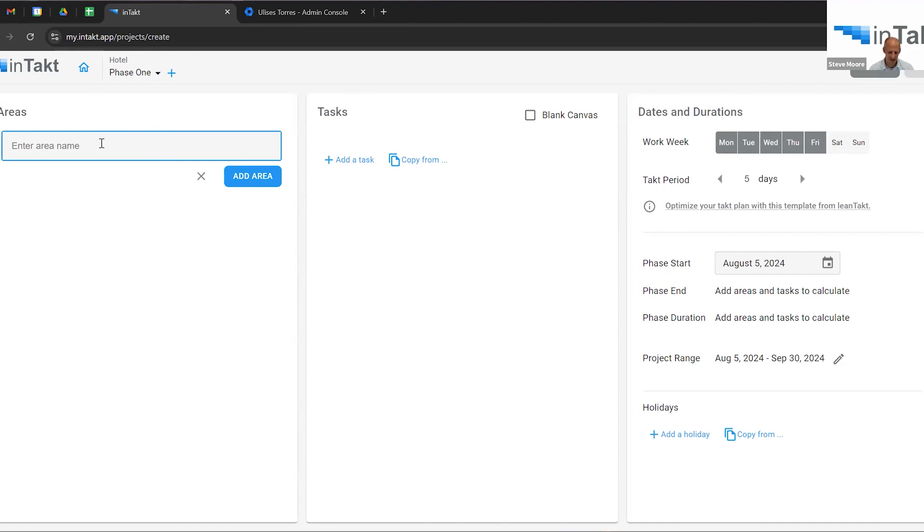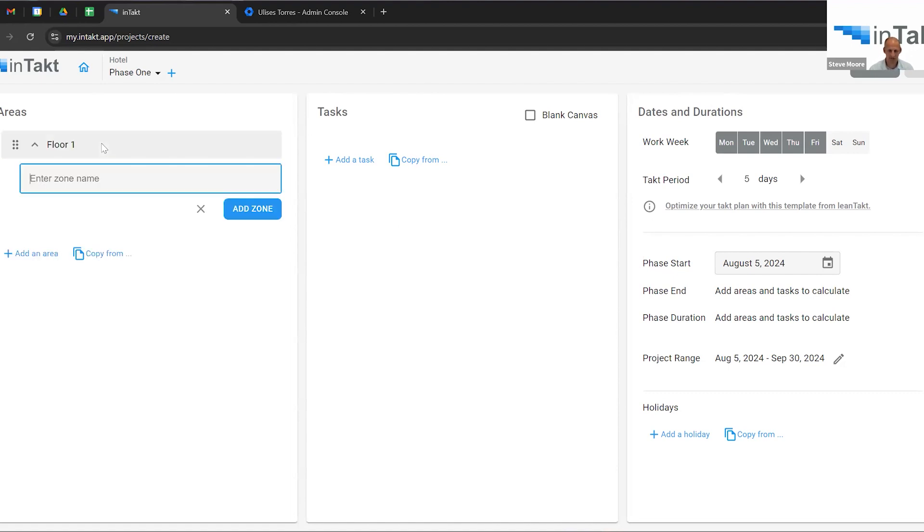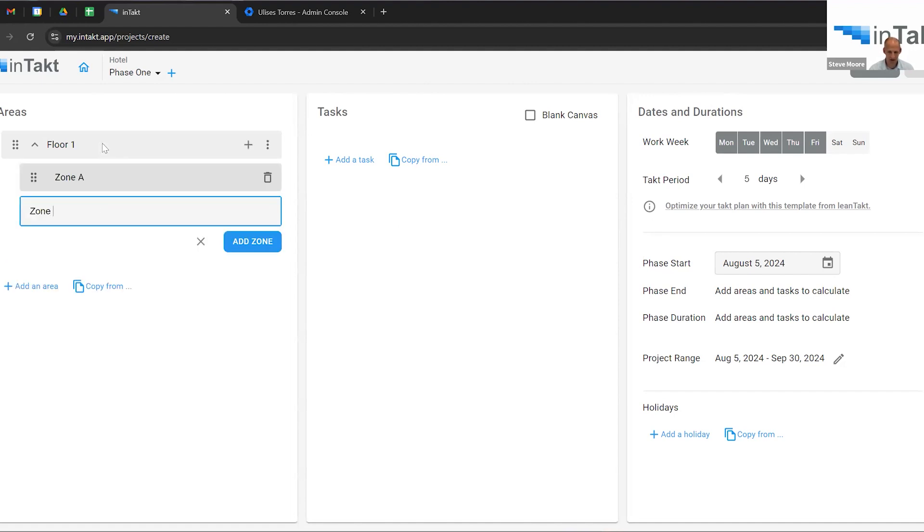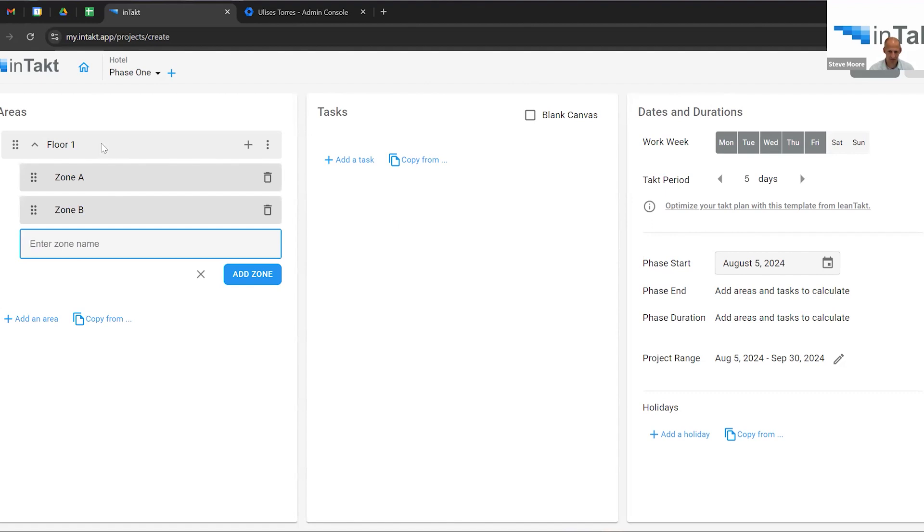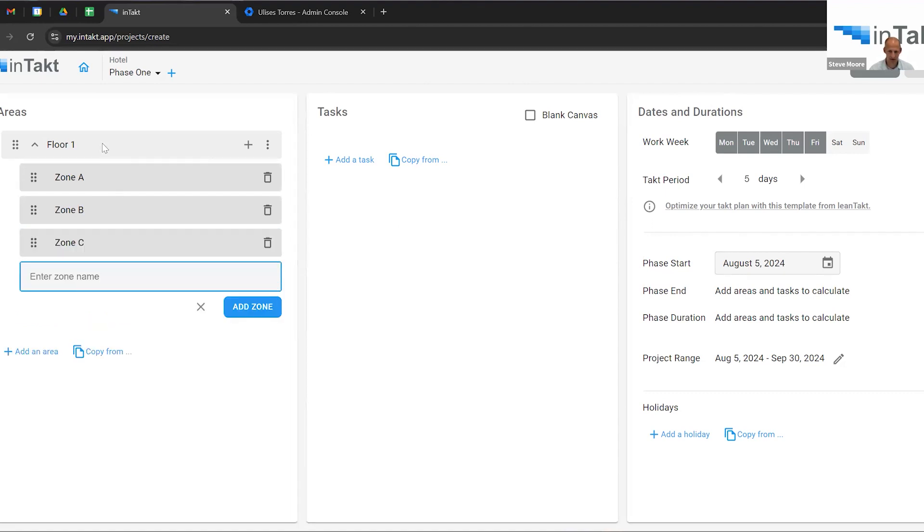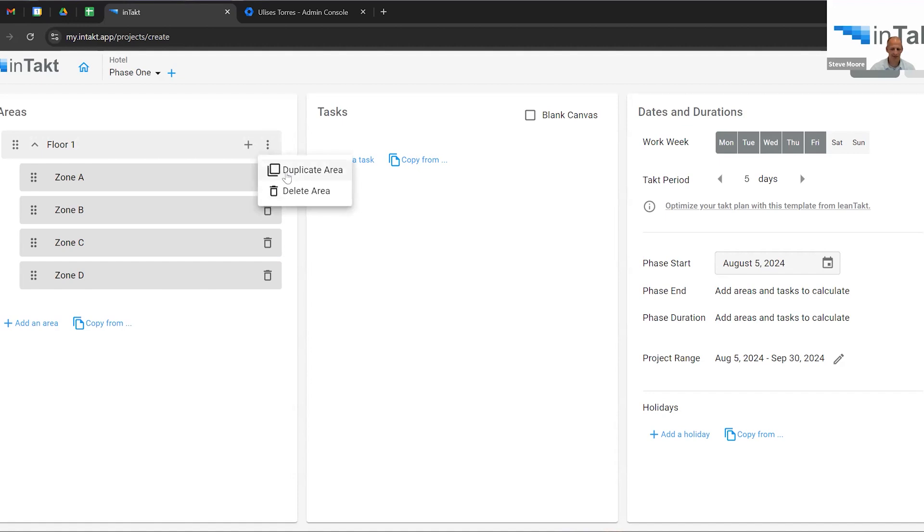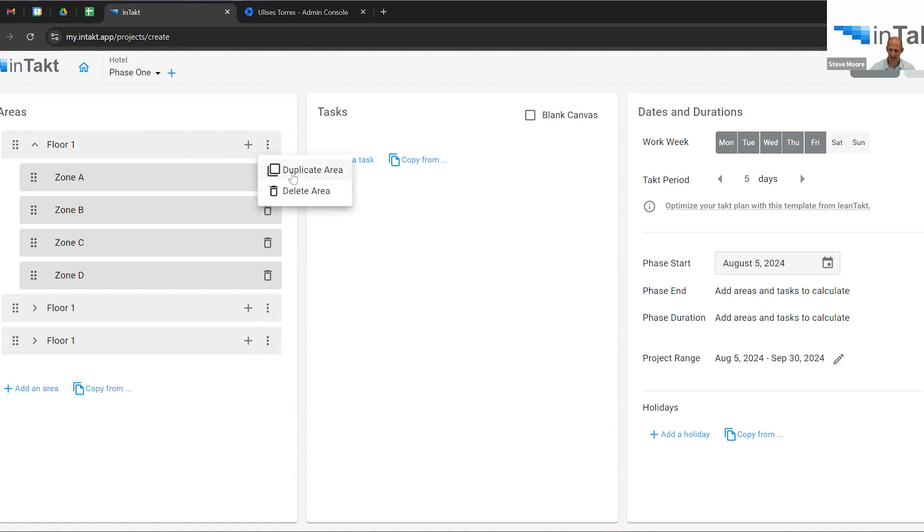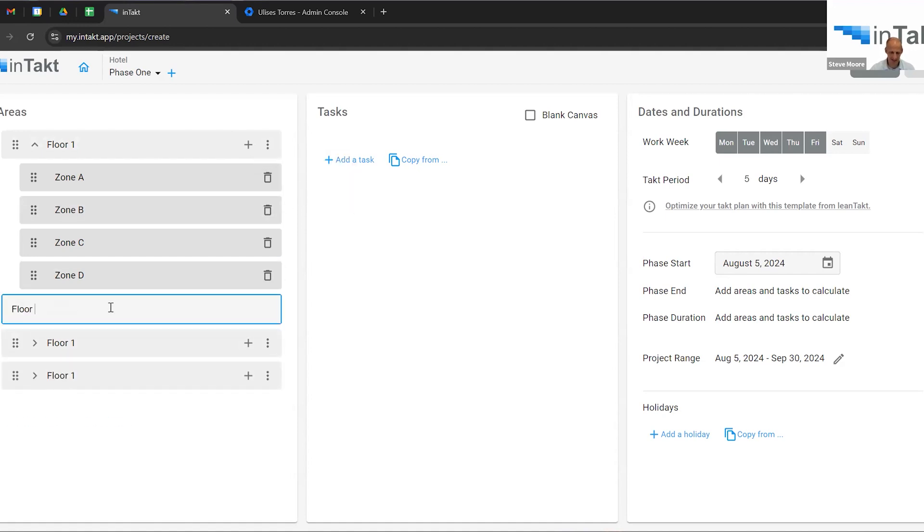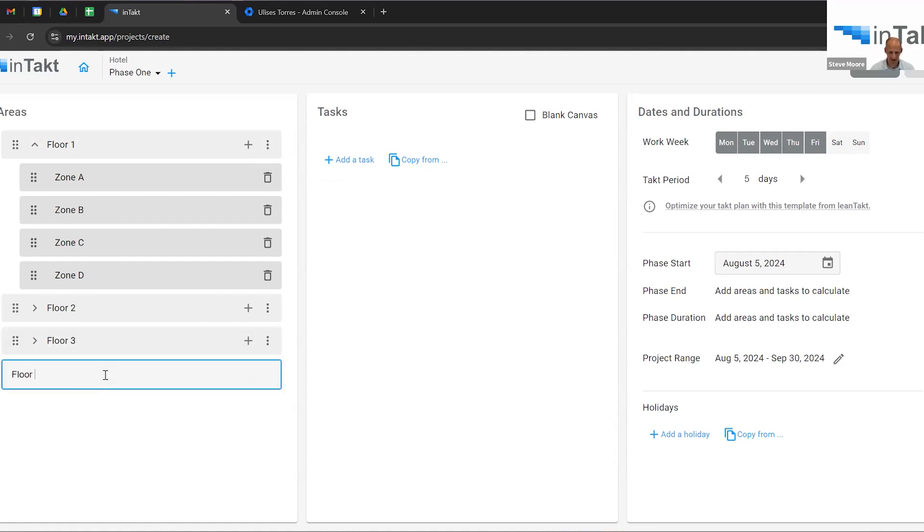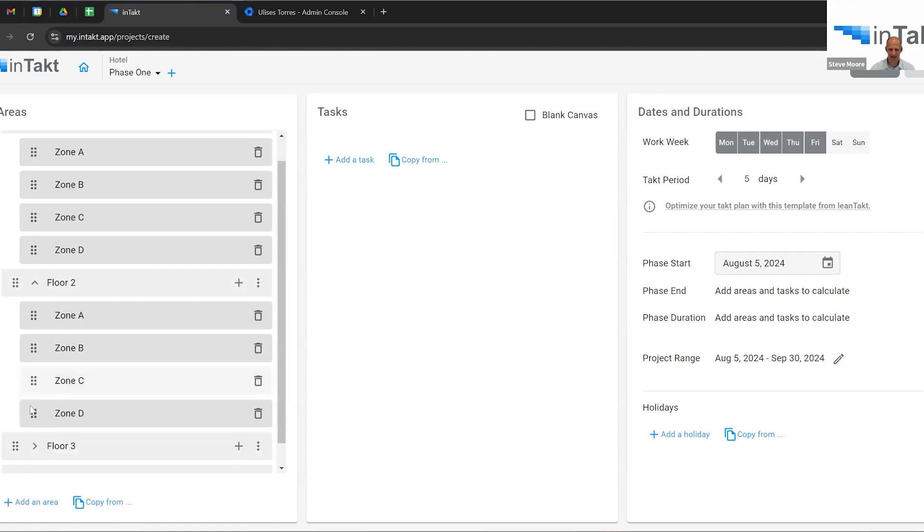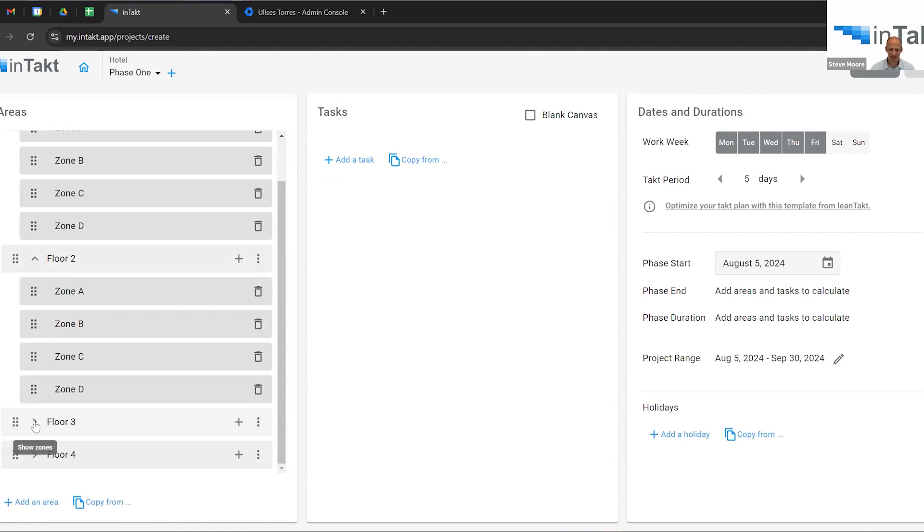I'll just start with a kind of interior build out phase. It's more simple and straightforward. So, I'm going to enter some of the floors here. Floor one and within each floor, we'll break out the zones of say zone A, zone B, and so on. We'll make four of those. And why don't we add a few floors to this? We make things dead simple to duplicate areas, to reuse tasks from other places. We want to really decrease the barrier for building schedules. I've already created, for those P6 nerds in this group, I've already created a pretty advanced WBS just like that.